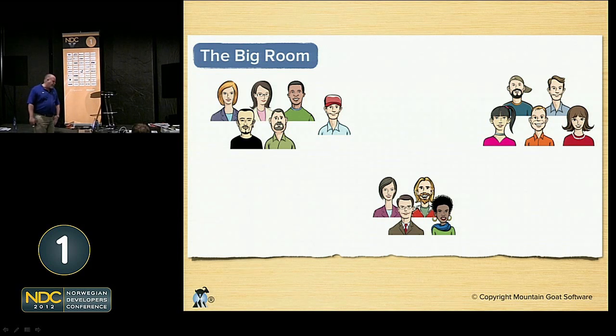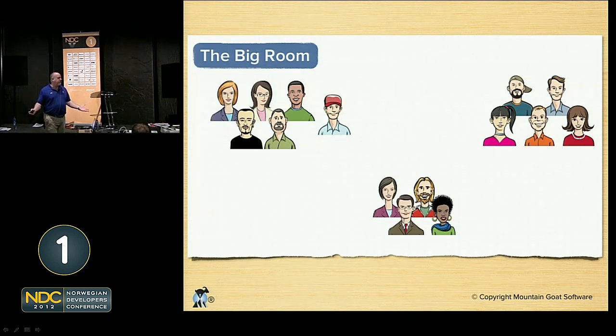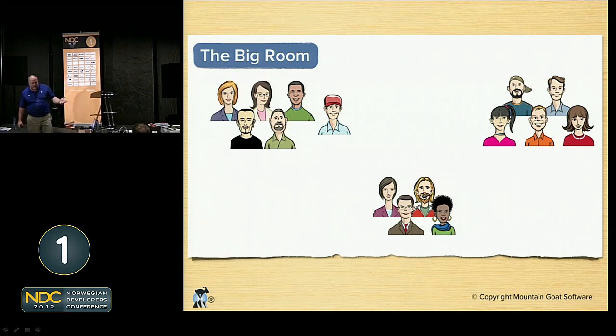Now, a little tip for doing this: one of the things I like to do is to get nautical signaling flags. Those flags that mean, admiral aboard, about to turn to starboard, stuff like that. Give each team a set of the flags that you're going to use. So each team might have 4 or 5 flags. Pick a meaning for the various flags. One of the flags might mean something like, we need the chief architect. Now, any team that needs the chief architect sticks that flag up on the wall near them.